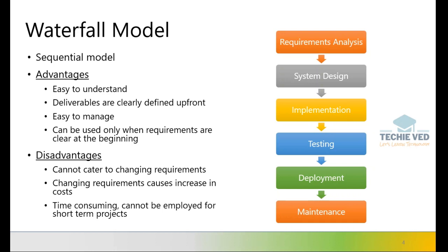Coming to the disadvantages, this cannot cater much to changing requirements. For example, say you are in the testing phase and the client comes up with a new requirement. What happens? You'll have to go back to requirements analysis, understand the new requirement set, and try to embed it into the already designed infrastructure, and then go for the implementation. This means higher cost, and it is again time consuming, because you have to go through the entire process. So that's the waterfall model.